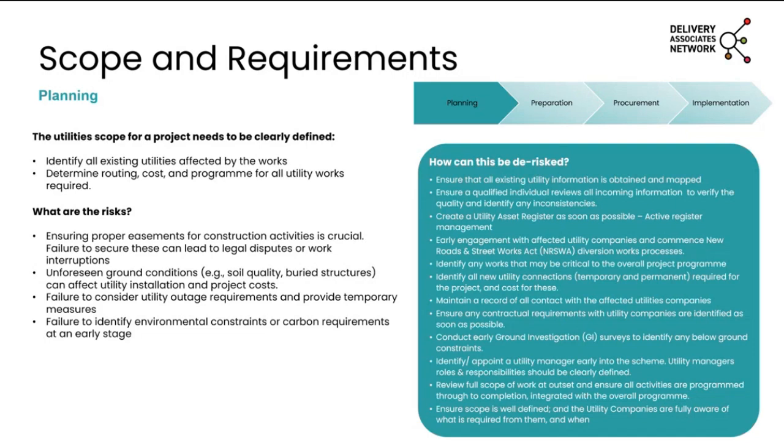Maintaining a record of all contact with utility companies. So a simple register, simply when you spoke to them, what you spoke to them about, keeping minutes of all meetings, making sure everything is recorded so both parties are happy with what's been agreed, recording of any actions and then tracking of those going forward.